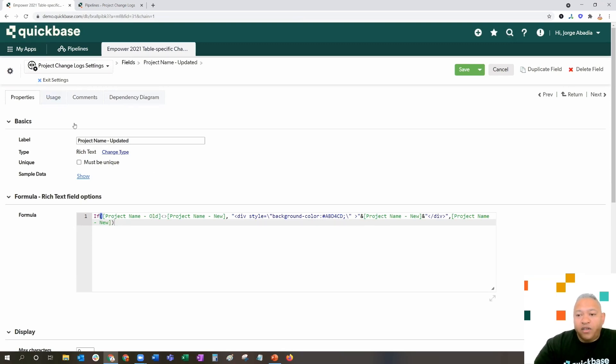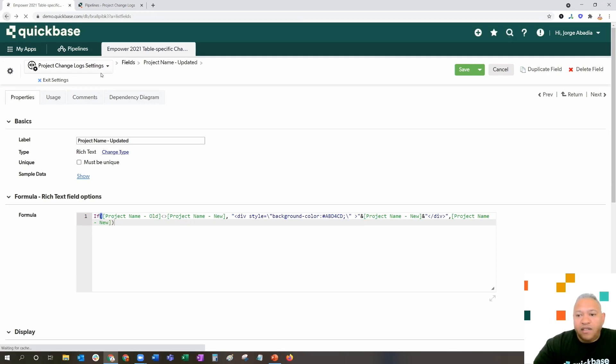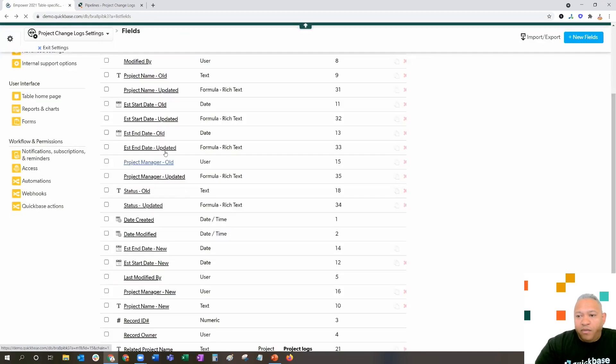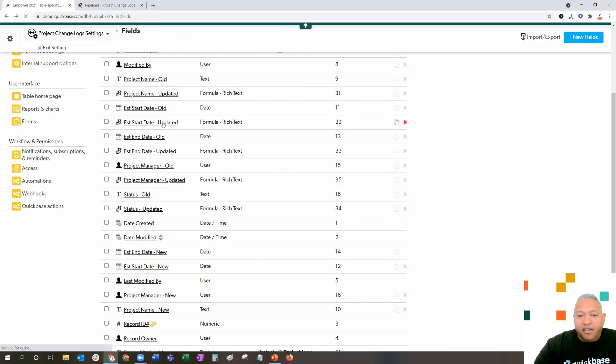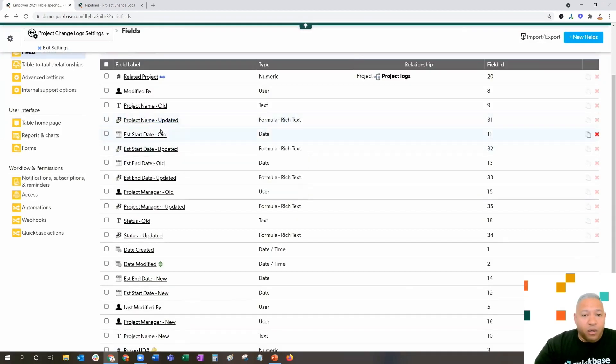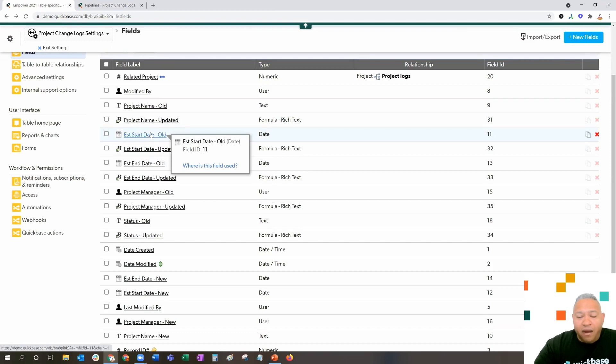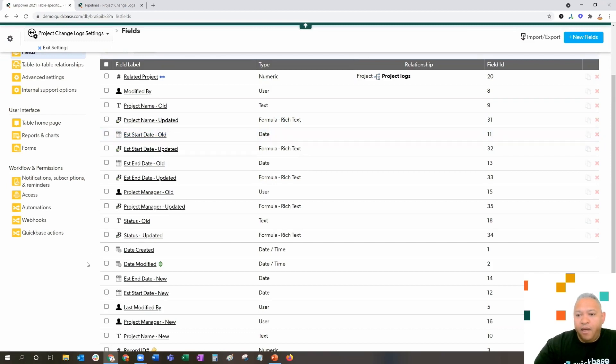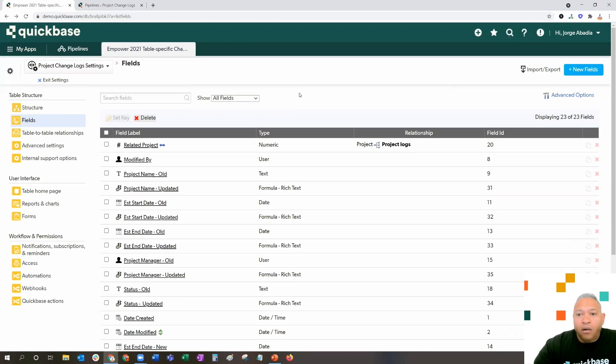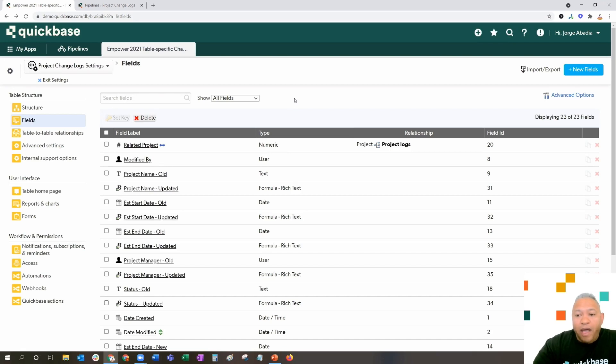This formula will be copied and available for you to use inside of the app in the exchange. That's how we actually create the highlighted features inside of the updated key. This formula is repeated across all of the fields that say updated. In essence, if old is different than new, we're going to highlight. If not, we don't. Now that we understand how the fields are constructed for our project changelogs, let's go ahead and go to the pipeline.